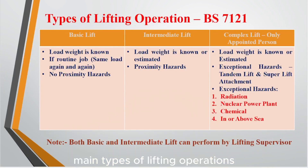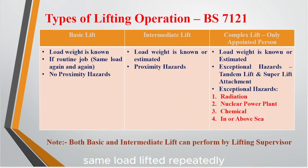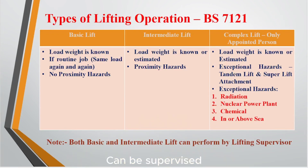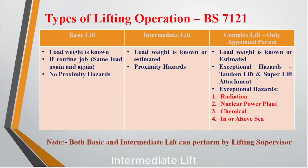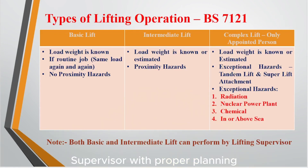There are three main types of lifting operations. Basic lift: load weight is known, job is routine, same load lifted repeatedly, no proximity hazards — can be supervised by the lifting supervisor. Intermediate lift: load weight is known or estimated, proximity hazards exist, still handled by the lifting supervisor with proper planning.